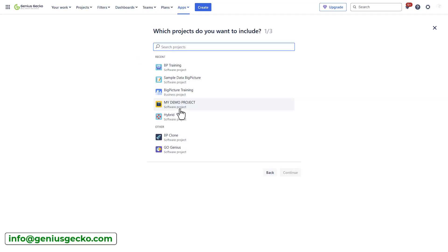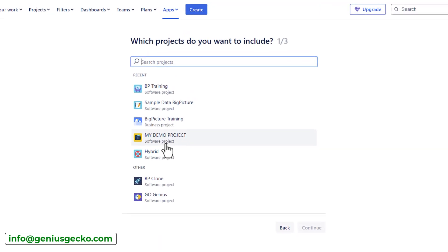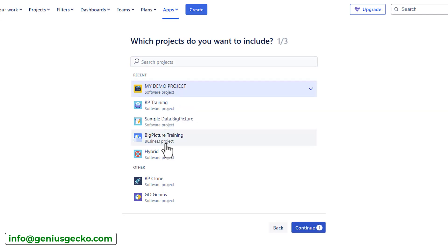There are three steps to set up your project or projects in Structure using the speed mode. The first step is to select the scope of your structure. What do I mean by scope? Whether it will be a single project or if you want to create a portfolio, meaning a number of projects. All you need to do here is to select the projects you want to work with.